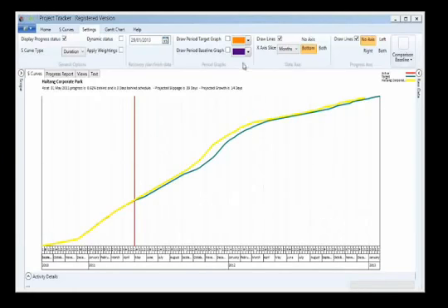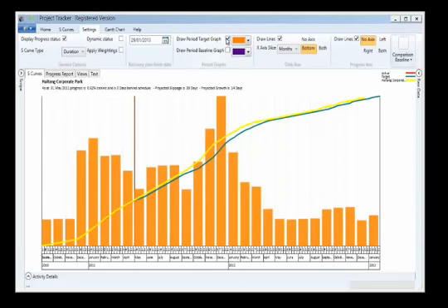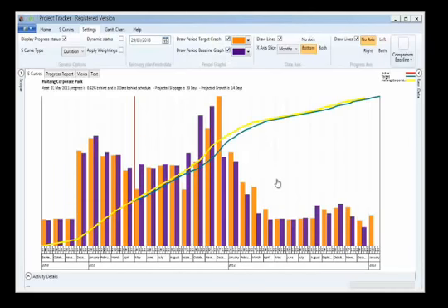We can further look at data by slice. So this is the duration per monthly time unit in this particular instance, and its baseline. So again, we can see more useful perhaps than an S-curve in this particular instance, maybe around October here, there is a lot less work going on than planned, and obviously this is where this variation happens here. So what we're trying to do is to use S-curves, which are great for reporting, often requested by clients, but also allow more feedback of information.